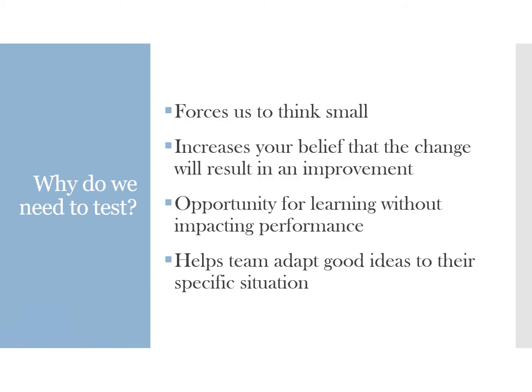So why do we have to test? We have a gap in mind. You have gone through and collected your baseline data and have an idea of where you currently are with respect to your measures and aims and where you would like to be. With that gap in mind, we can think about several changes that may have the desired impact and see how they can help close that gap. We want to close the gap incrementally so that we can see if something works and then scale it up and have a larger impact.